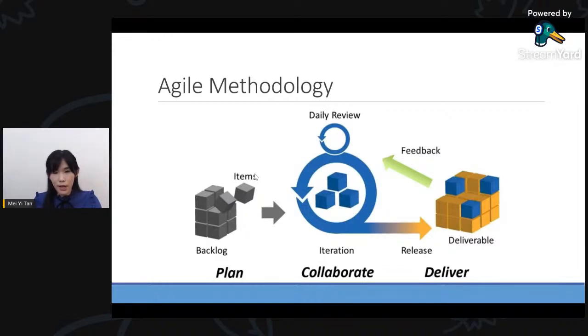So just remember that for all projects, regardless of whether you are using a waterfall management method or an agile methodology, you will need to set a deadline for your project. Because every project, of course, has a deadline, right? It won't be like my whole data analysis project, I work on it for 1 year and I still see nothing and it can't help in decision making. So we need to set a date for every sprint. Usually what I do is we set around 2 to 4 weeks for every sprint.